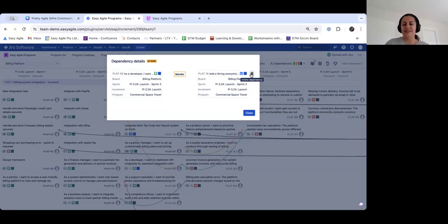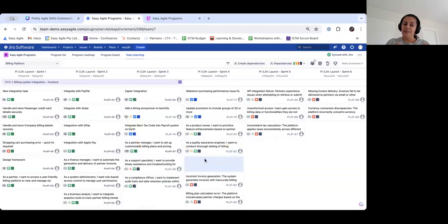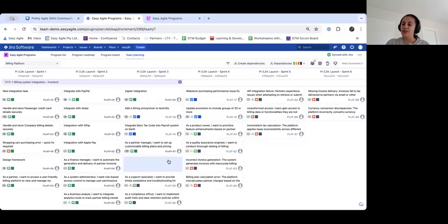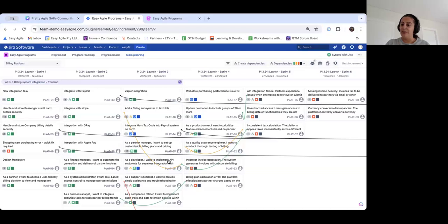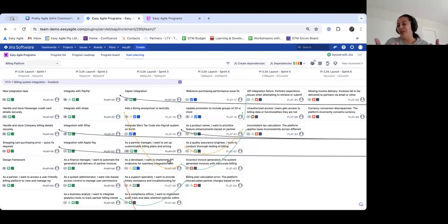Not necessarily delete. I'm thinking about when we used to manage these risks manually, we would close out the risks, but we would retain them in a repository so we could see them in future, so you didn't repeat. There are learnings that you can get out of how risks were managed historically.